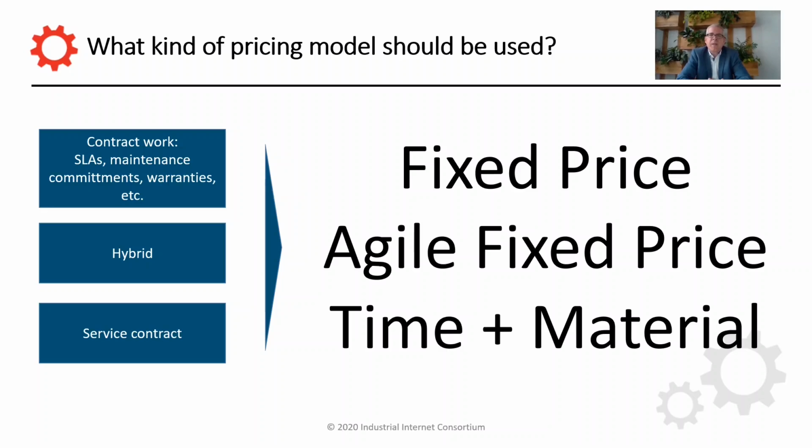So for example, time and material combined with a cost ceiling, and then in a later stage, once the solution is more mature and it's easier for both sides, the supplier and yourselves, to get to firm agreements regarding the SLAs, the maintenance commitments, etc. So for this, most likely you will have to apply a staged approach. So these are your options, and you have to, as part of your project plan, of course, make sure that you early on agree on what's best for your own needs.